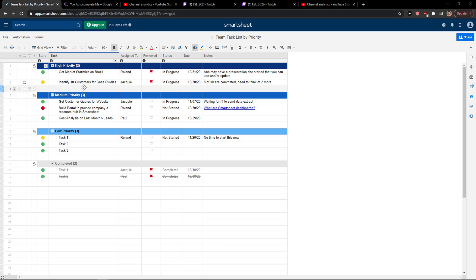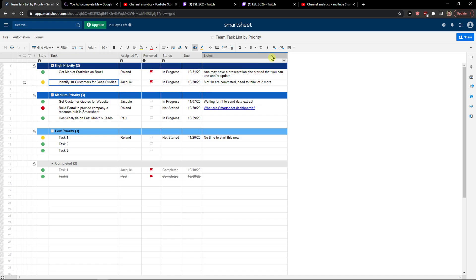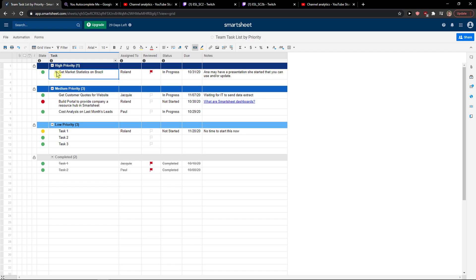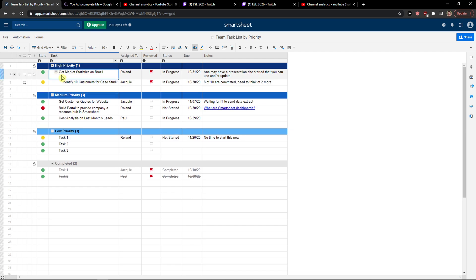Let's say I have a task here and I want to make it a subtask. What you need to do is just click this button here, 'Indent', and when you do it, you will automatically create a subtask in your task.